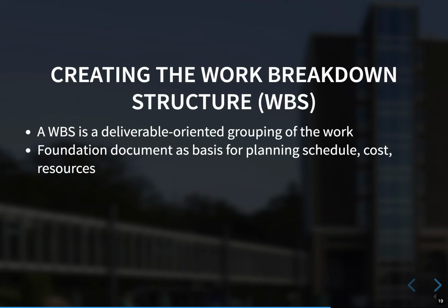And it's decomposed; decomposition is subdividing the project deliverables into smaller pieces. So you decompose all the work you have to do into smaller pieces as far as you can and as early as you can. You define in your work breakdown structure all the tasks and work packages for completing the deliverables.